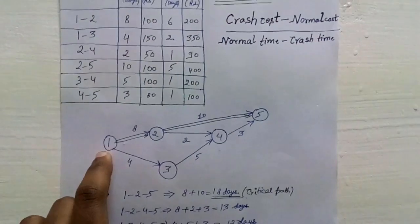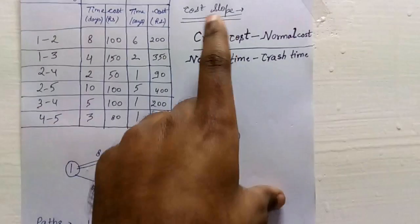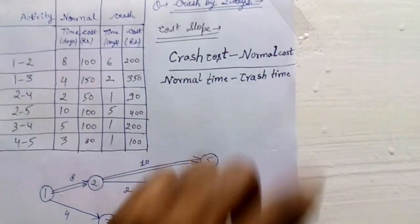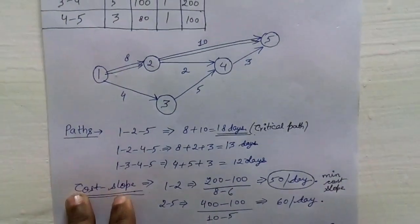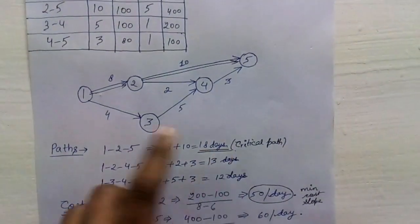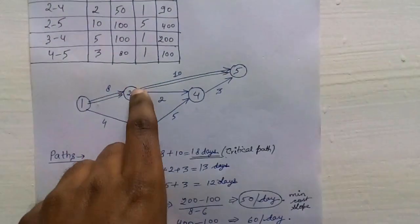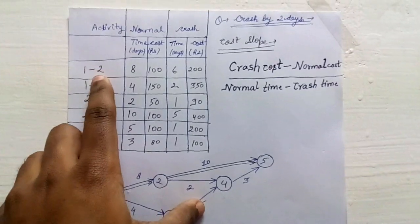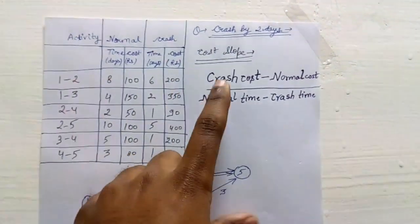The cost slope formula is: (Crash Cost − Normal Cost) / (Normal Time − Crash Time). Since 1 to 2 to 5 is the critical path, the activities on it are 1-2 and 2-5. Cost slope for activity 1-2 is: (200 − 100) / (8 − 6) = 100 / 2 = 50 per day.